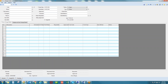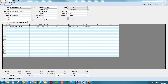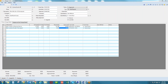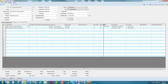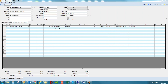Within the change order screen, you can enter, track, and manage your client change order. You have the ability to track the status of the order, various submission and approval dates, and the requested amount versus the approved amount. Additionally, you can enter budget adjustments and subcontract change orders related to the client change order. Here you can see two subcontract change orders issued for one owner change order, and you can control the status and the date approved.